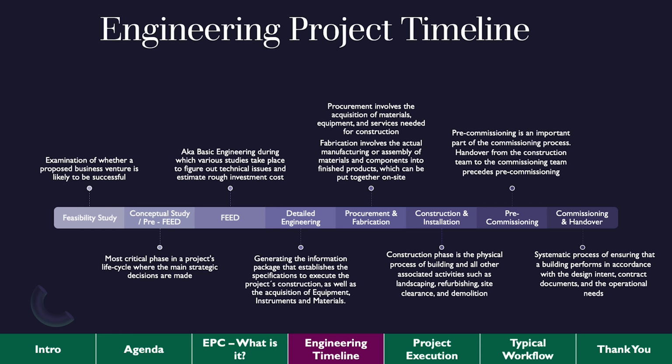Absolutely. Does anybody know how much it costs to change scope when you're installing a piece of equipment? It's exorbitant. That's a lot of money, and that's where a lot of projects go wrong, spot on. If you look at the timeline there, from a cost perspective, the earlier you pick something, the lower the cost. As you progress, that cost grows exponentially, not linearly, because everything has to be restarted from the beginning, since you're spread across a big web.